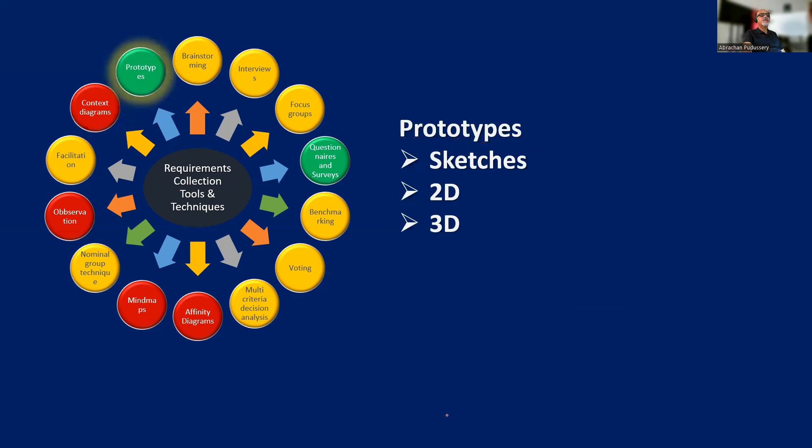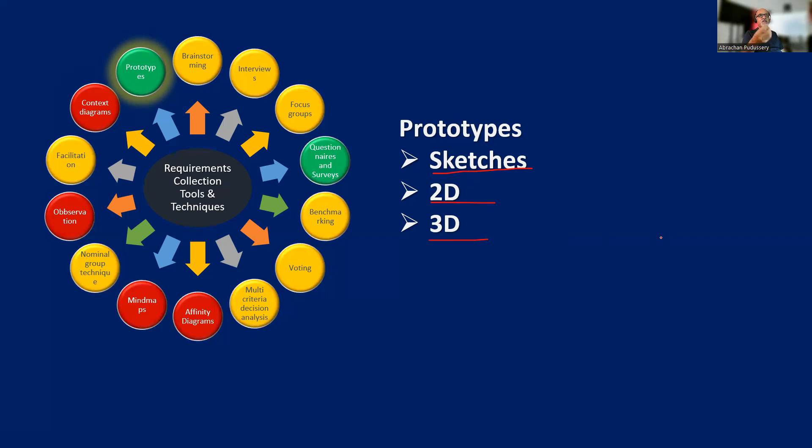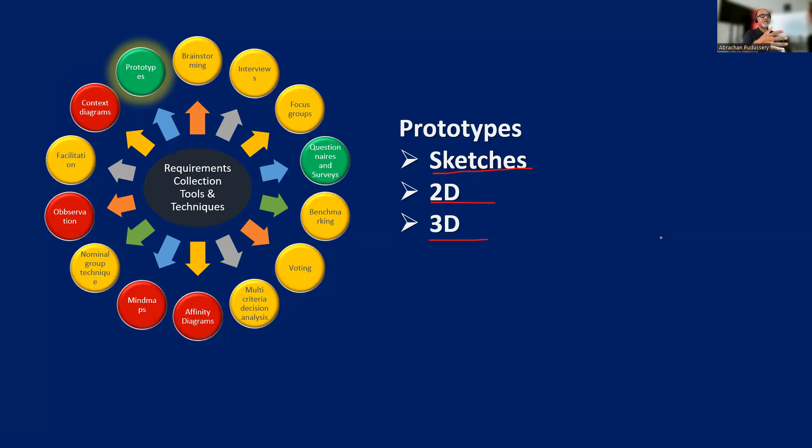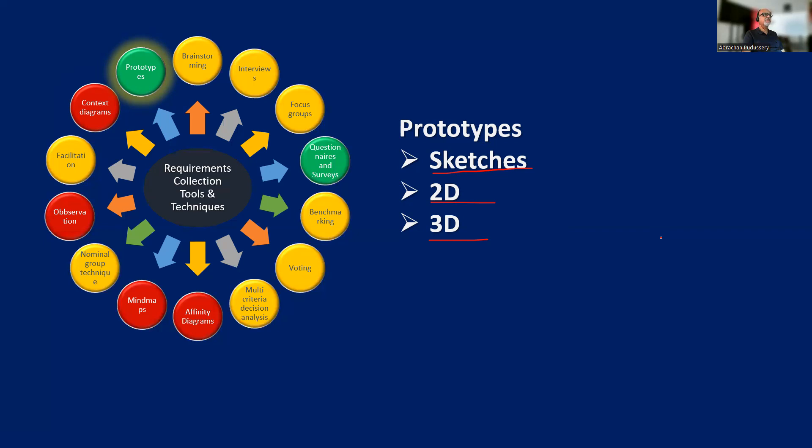Then we have prototypes. We may start with sketches, which can get expanded into 2D drawings and then 3D drawings. We've already discussed about building information modeling and 3D systems. Prototypes help the potential users to visualize what they are going to get better. So that acts as a facilitator for deriving additional requirements, as well as validating the current requirements.